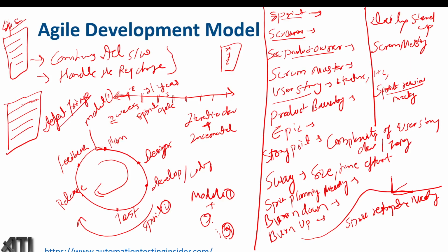So what do you mean by defect triage meeting? Let's say we have a 2-week sprint cycle. At the end of the first week, we conduct this defect triage meeting. The dev team, testing team, probably the product owner, and the scrum master join. We discuss how many defects are in open state and how many we have closed, and we prioritize the open ones to fix them as soon as possible. If any defect is not important, we can defer it to the next sprint. Do not worry about how to prioritize or assign severity to a defect, we'll discuss that in the defect life cycle later on.